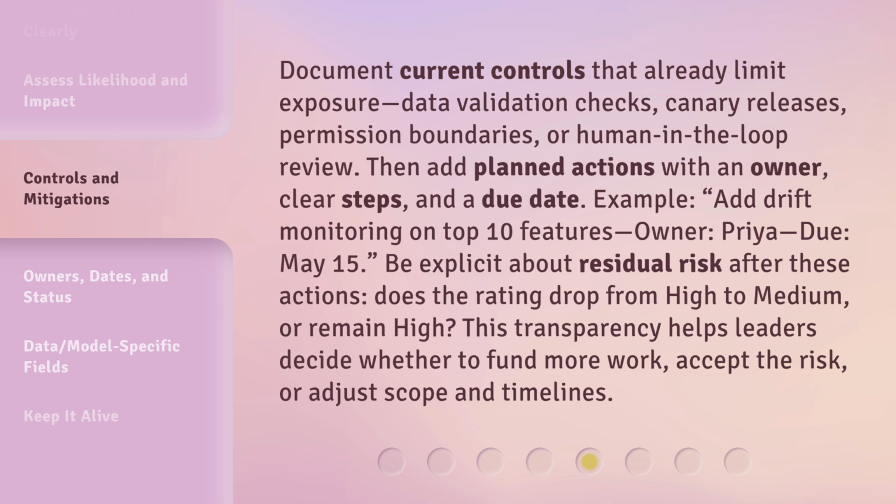Be explicit about residual risk after these actions. Does the rating drop from high to medium or remain high? This transparency helps leaders decide whether to fund more work, accept the risk, or adjust scope and timelines.